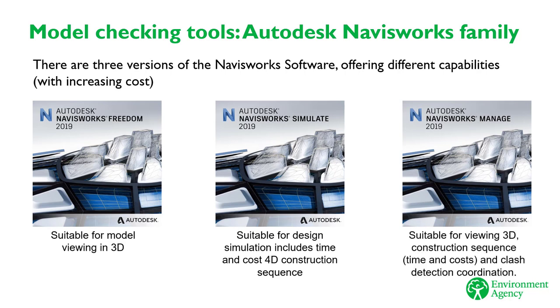3. Navisworks Manage offers all features that Navisworks Simulate does, plus the capability to conduct clash detection, including interface checking and issue management coordination controls. This can be crucial for capturing issues in the design coordination and monitoring the closeout of the issue with the design team. It is typically used by BIM specialists or BIM managers.